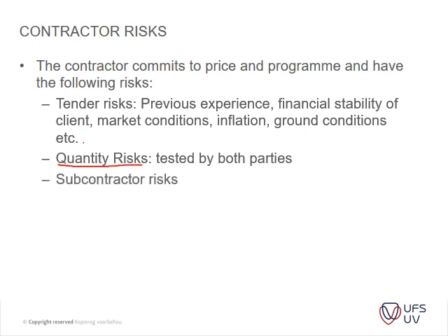And then you have subcontractor risks, guys not producing. And then obviously you have design risks. If the designers actually looked at everything, you may argue, but that goes back to the designers, but it still stays a risk, even because if there was a design mistake, it's still the contractor that might be influenced. For instance, now the work has to stop while a design is fixed, so that's where your time is. RFIs and information requests is very important.